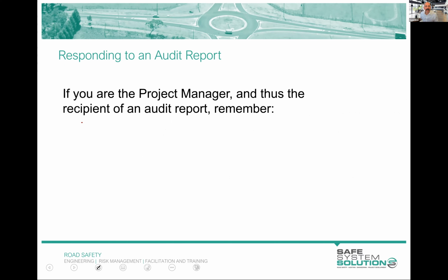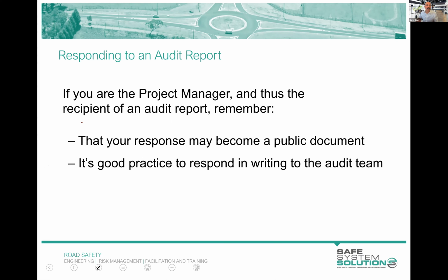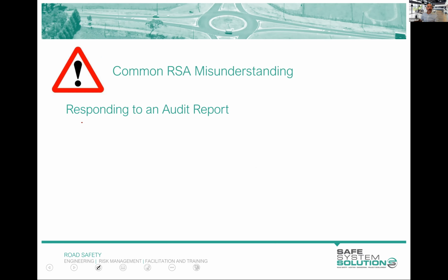So when you're responding, if you are one of those people that receives a road safety audit report, remember these few little things. Your responses may become public, so you want to think a little about your wording in case freedom of information comes through and takes that, or there's a legal case and your documents are taken, and it does happen. It's good practice to respond to the audit team as well, just to keep them in the loop. It's nice. It's not absolutely required.